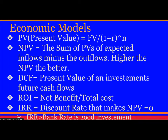Now for Economic Models. First is Present Value — before selecting any project we should calculate the present value, which is calculated as Future Value divided by (1 + interest rate) raised to the power n. Net Present Value (NPV) is calculated as the sum of the present value of expected inflows minus outflows.